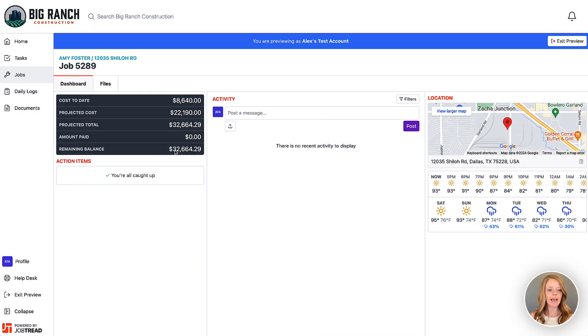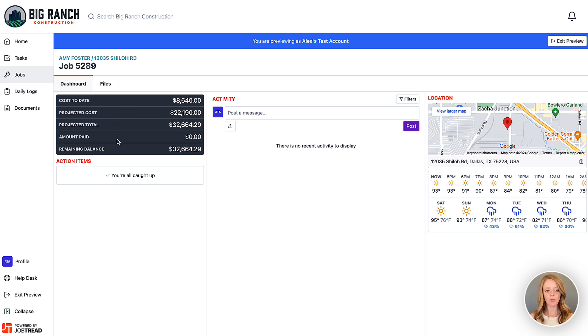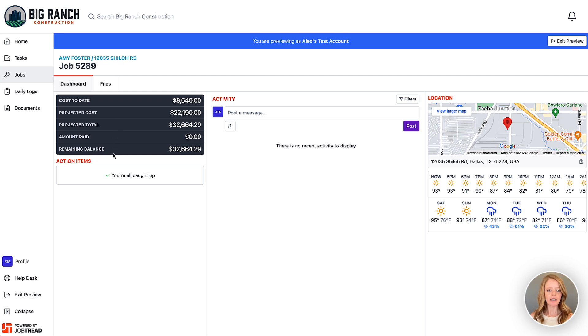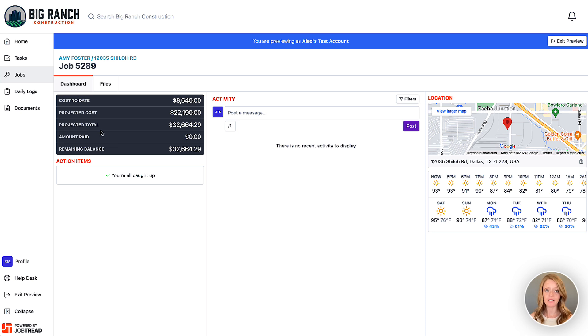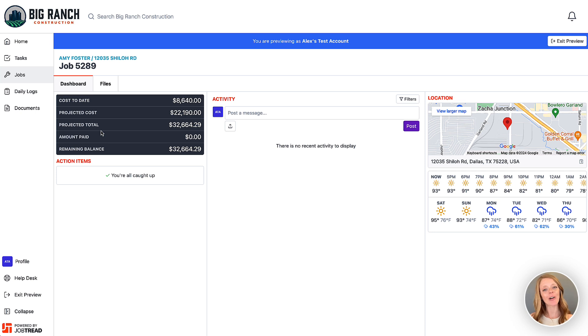However, if we change this again to a cost plus job, now I'm going to look at their portal. Now you're going to see the cost of the project to date. You'll also see the projected cost, projected total, the amount paid, and the remaining balance. So they can really clearly see the cost of the project separate from the total of the project, which would include your profits. If you have any questions, please contact your customer success manager or email support at JobTrad.com. Thanks!